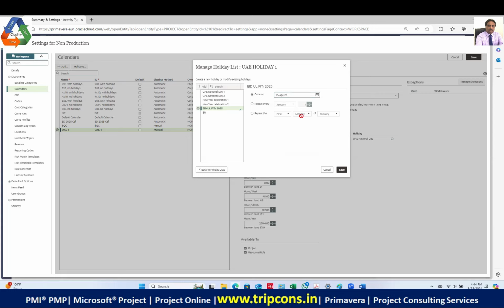So why I'm marking it for 2025, I'll explain to you the logic. If you know Project Online or Primavera P6, you need project management maturity. The maturity is that the year 2024 is gone, but I'm going to mark it on the 10th of April 2025. Okay, guys, listen to me very carefully. The logic is that when my company declares the list of holidays for 2025, I'll adjust it. What happens if my project is going over multiple years? My finish date will be correct. Is that clear?